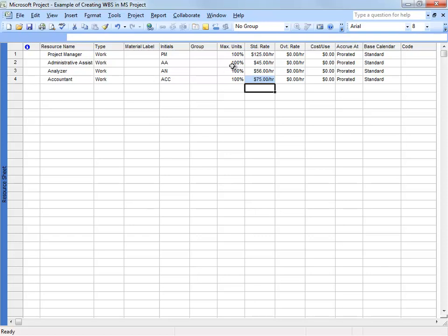The percentage will be shared between the different projects within the organization. So for the time being, I have only one project, so I will put 100%. If we have multiple projects, then we have to divide it to different percentages based on the participation of that person within the different projects.